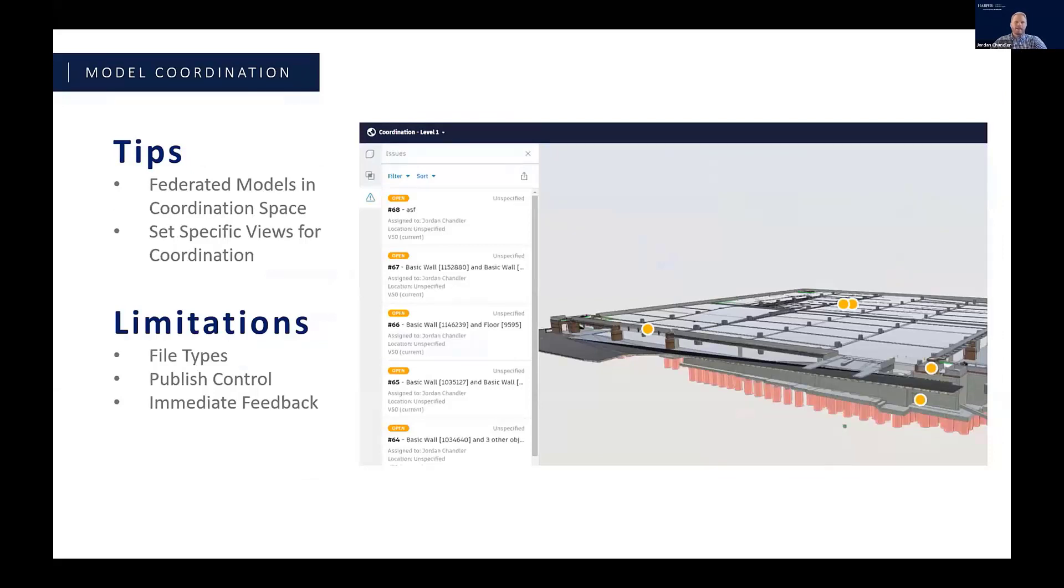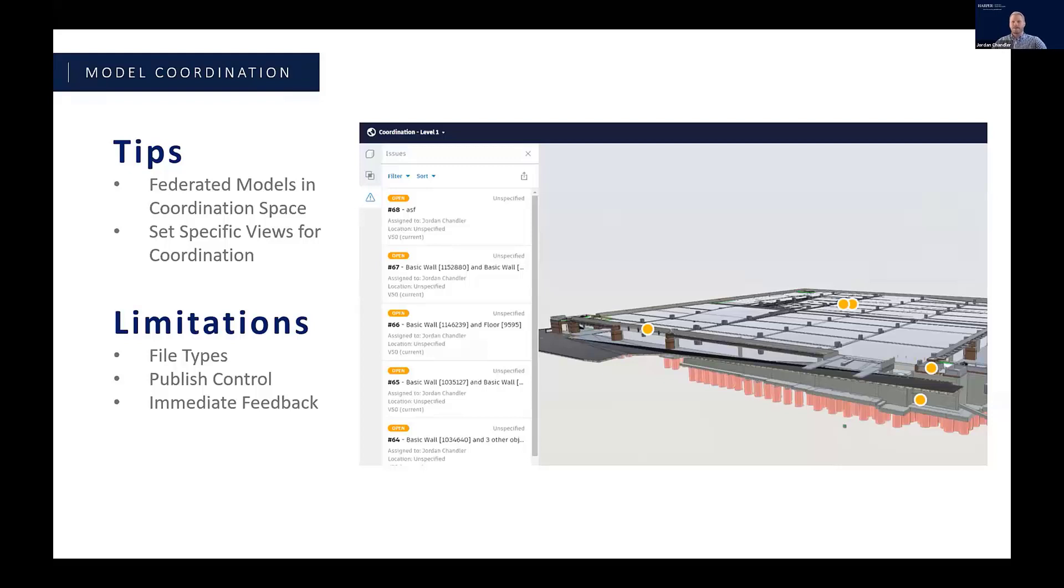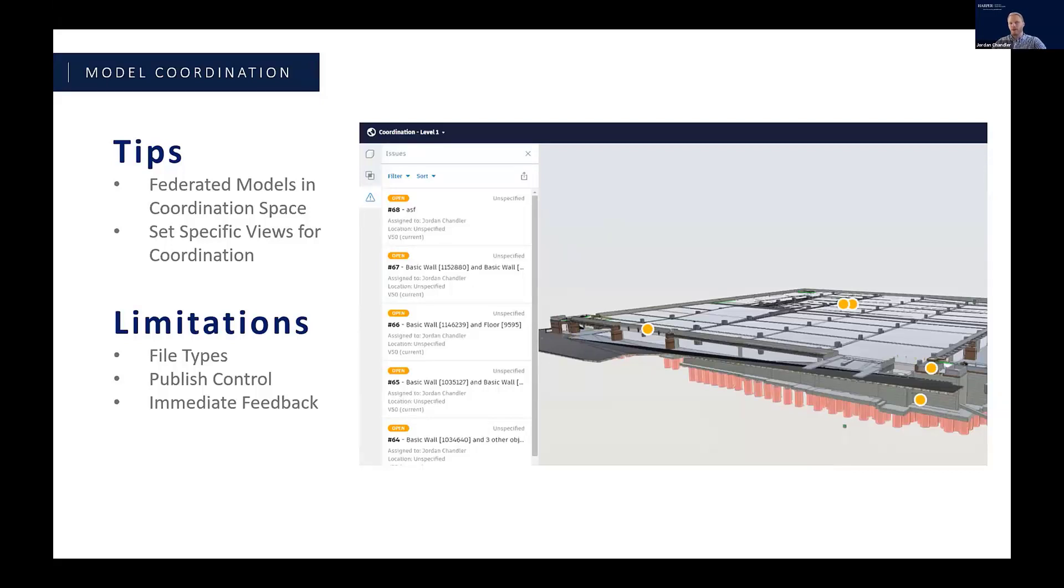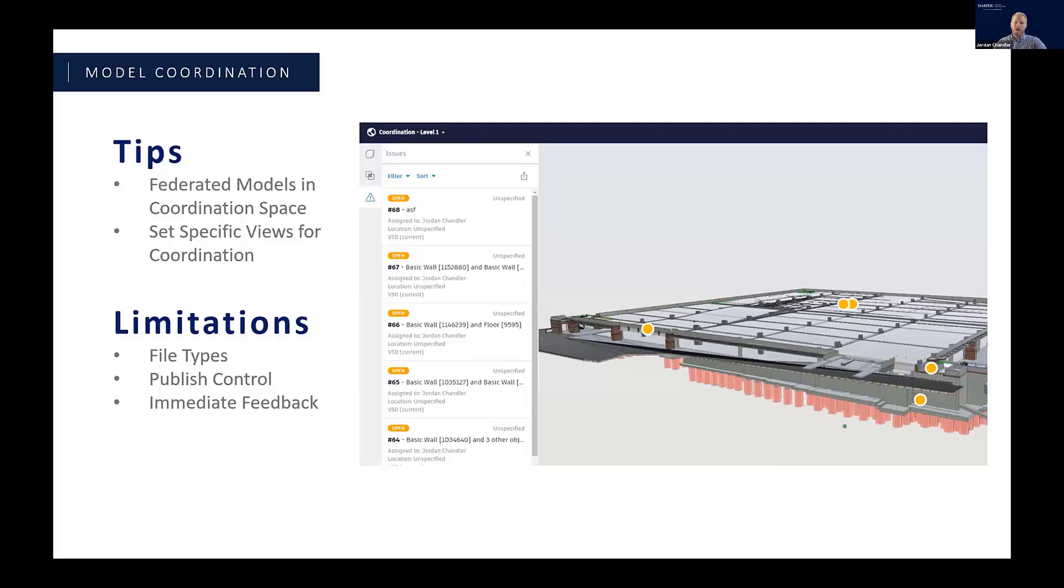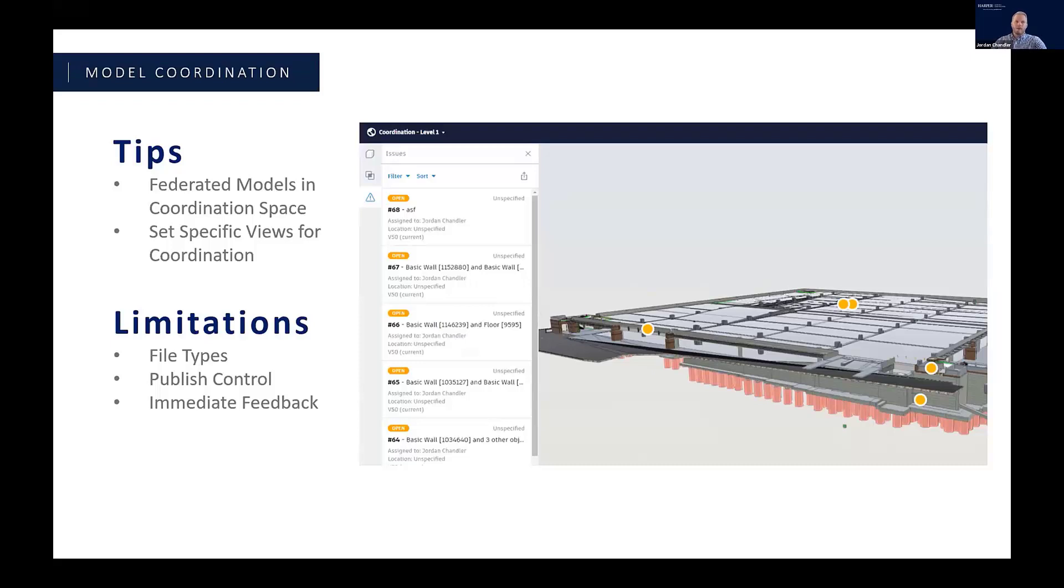And then I guess lastly I just wanted to throw out some tips out there. Again, it's a really flexible platform. There's a lot of ways you can set it up. You can really figure out what the constraints of your project are, what your project team looks like, whether you're on the construction side or the design side, and you can set up the coordination workflow to kind of match that or be the best fit for your team. One thing that we found that was really helpful was setting up, we created a coordination space and then set up a federated Revit model inside that coordination space. And that allowed us to link to all of our design models or detailing models to bring that data in without actually having to create a copy of those models or have people working inside of the coordination space. And so that process was pretty straightforward. I was able to just link everybody's data in, create a bunch of views for all the coordination areas that I wanted to see, and then anytime I wanted to update that coordination set, I could just go and publish the views and model coordination would be completely updated from all the separate trades.